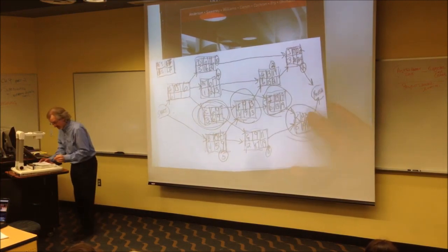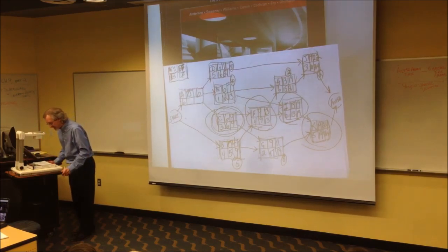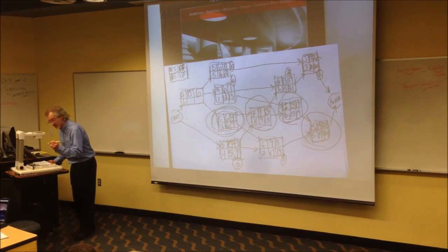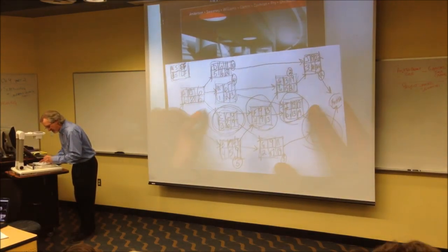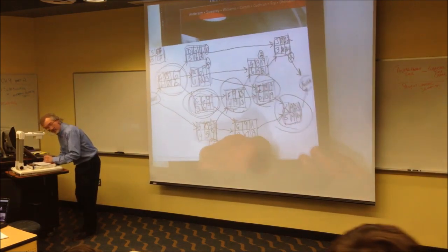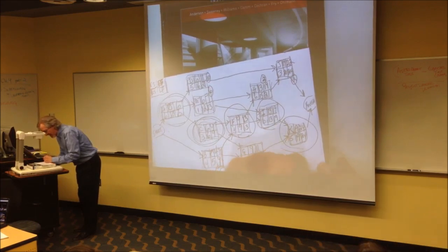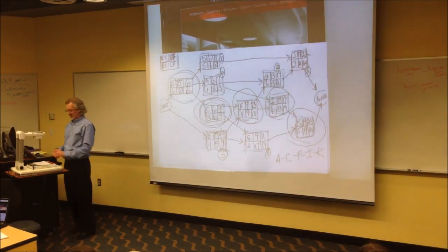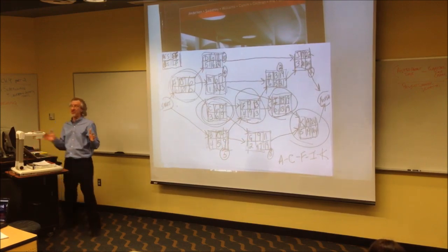They're both 5. And then A has 3 activities after it. What are the 3 numbers? 16, 12, and 6. And we're choosing the smallest, which is 6. Subtract 6 and 0, what we just identified. Our critical path, help me out. A, C, F, I, K. Very good. That's our review. I think you got it.